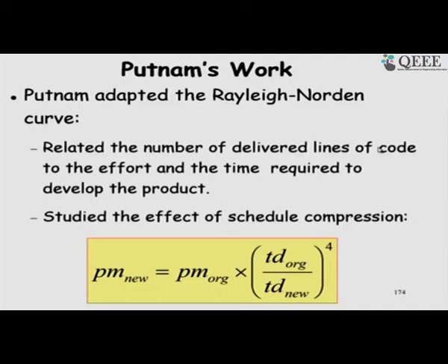What are they doing? Are they doing something new? No, the same software is being developed. So, where is the effort going? The answer is that once we try to reduce the development time, we have to employ large manpower, and then we cannot give them work all the time. So, they will be mostly idling.